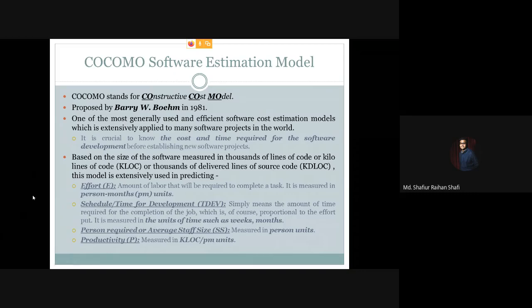The first thing to predict is effort. Effort means the amount of labor that will be required to complete a task — to complete the software project. This effort is measured by the person-month unit.